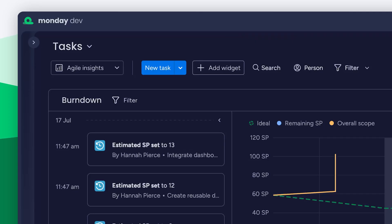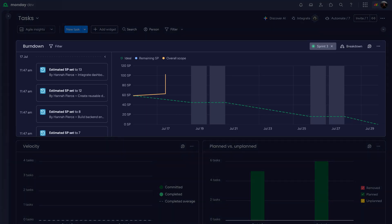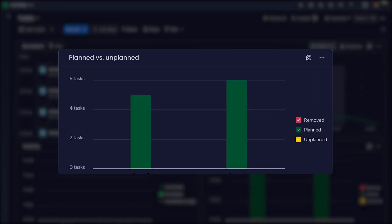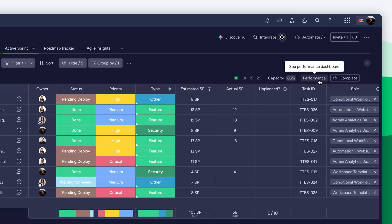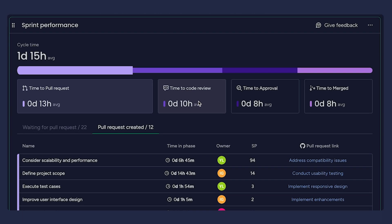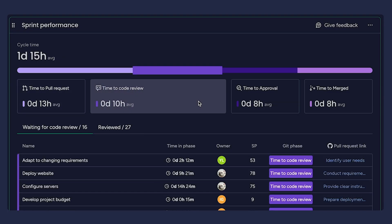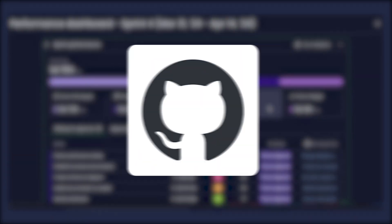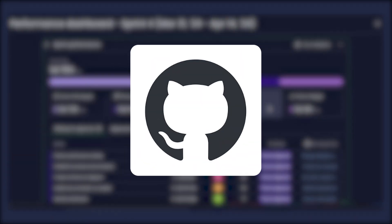Use the Agile Insights view to track burndown, velocity, and planned versus unplanned work. And the performance dashboard to monitor bug volume, cycle time, and throughput across sprints, all fully synced with GitHub in real time.